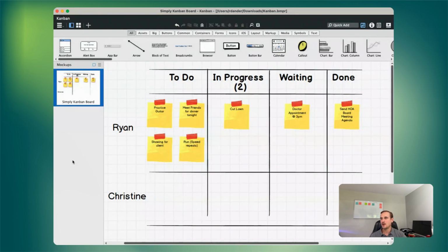And if you put a WIP limit in place for your stages of work, you're increasing your efficiency. And what that really does is it changes your mindset to say, okay, I can't really bring in more work until I finish what I'm actually working on, and that produces value. I can move it to the next stage. So that would be one reason why you do it.